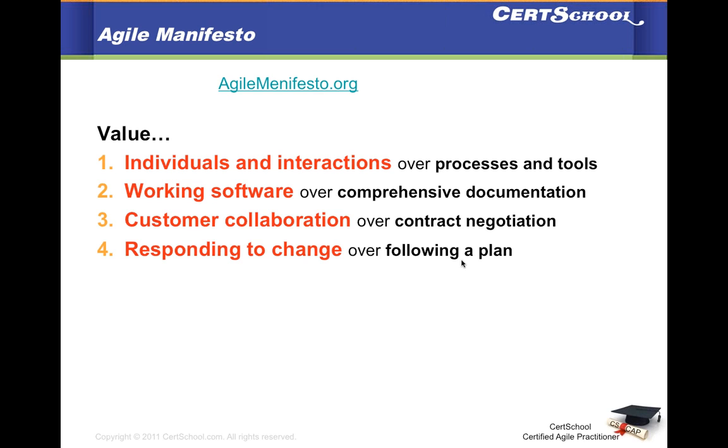In a traditional cycle, you took all the requirements from the customer today, you started pounding on that work, you created design, you architected it, started doing development, started doing testing, and now when you have come to the UAT phase, which may be 6 months from today, you realize that you made a mistake in your understanding of the requirement, or you made a mistake when you were writing low level specification. You can imagine this is the core reason why software projects in this traditional form of execution fail. It's because it is impossible to go back 4 months and change things and expect to deliver that software now.